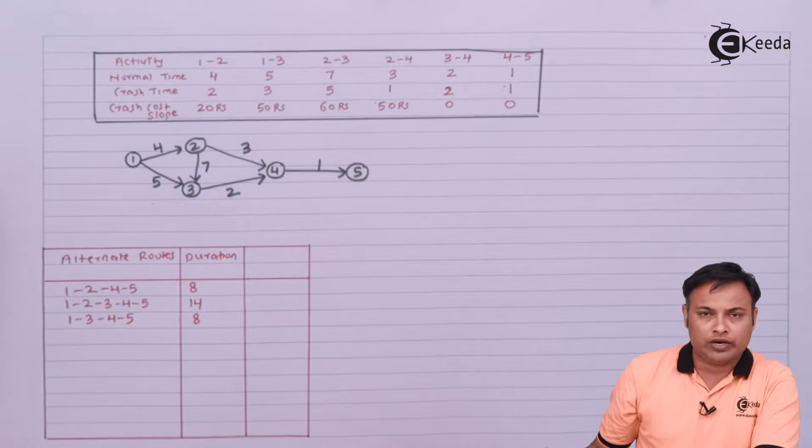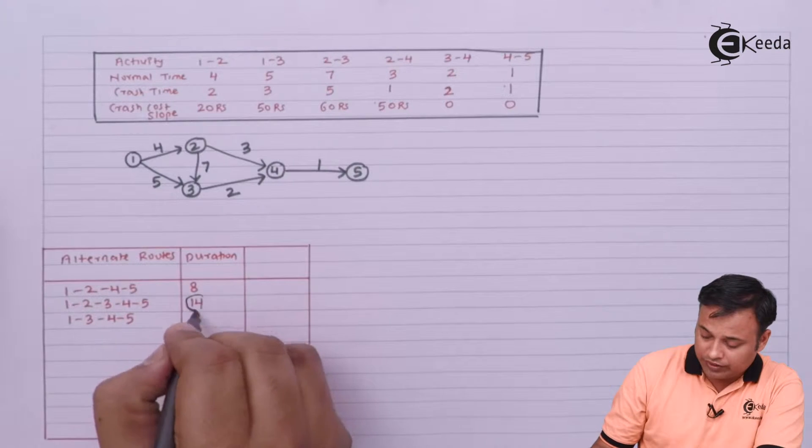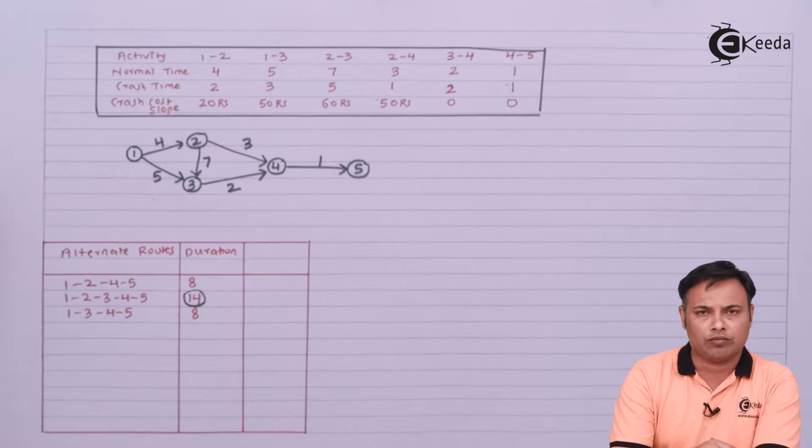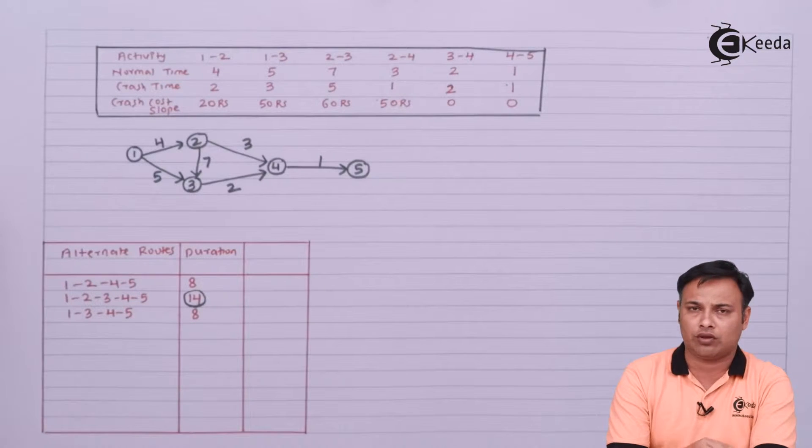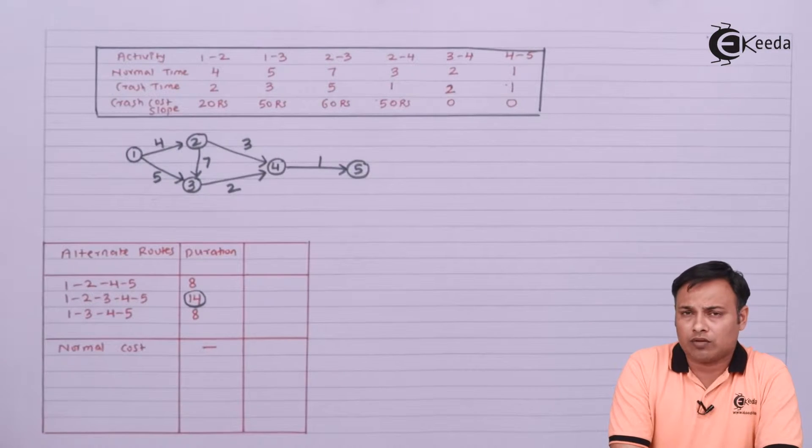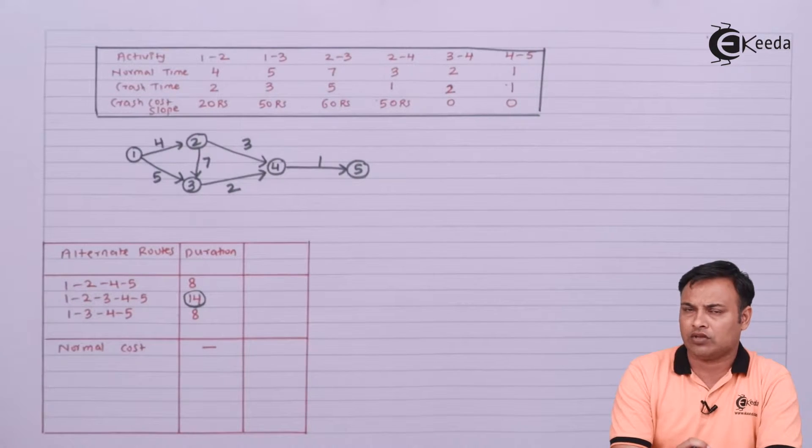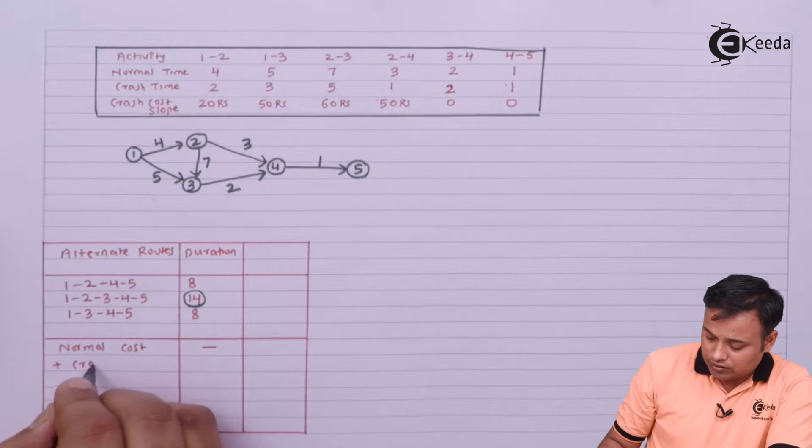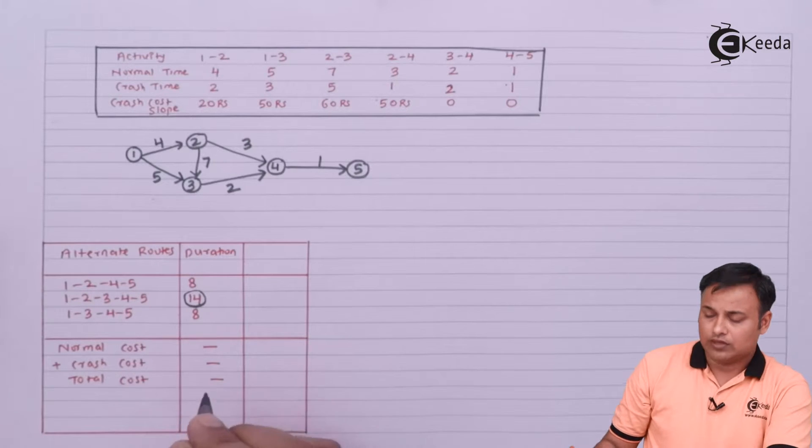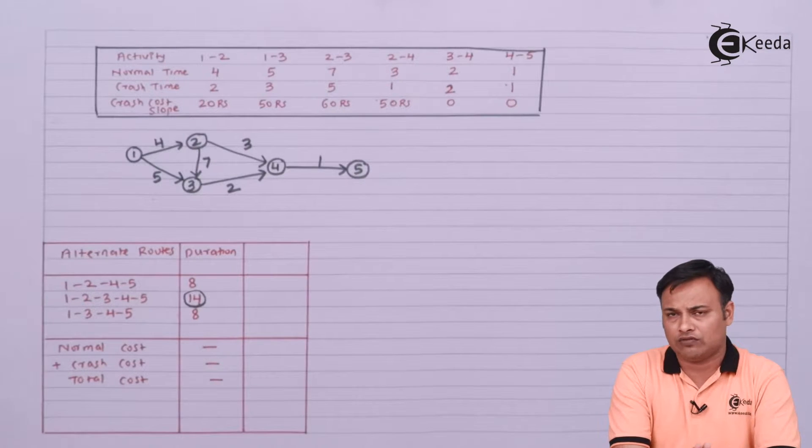So we have 1-2-3-4-5 with a duration of 14 as the critical path. My normal cost is not given in the problem. If it is not given in the problem, we can simply ignore the calculation of normal cost. We can always work only on the calculation of crash cost. Since I am not given the normal cost, I will put a dash against it.